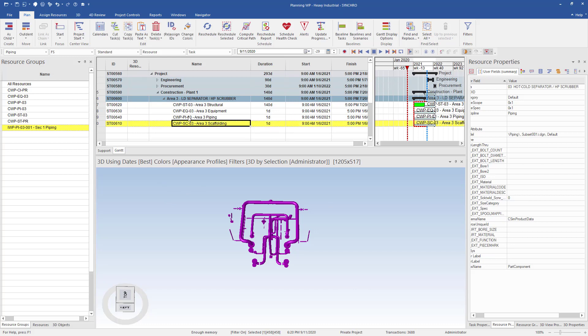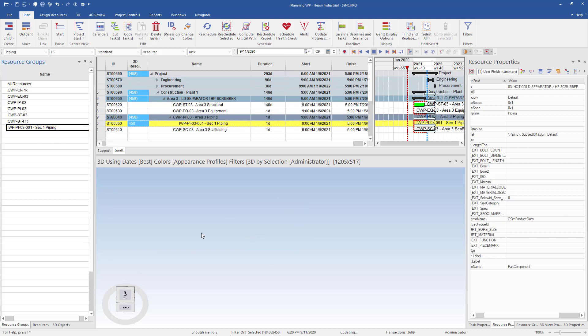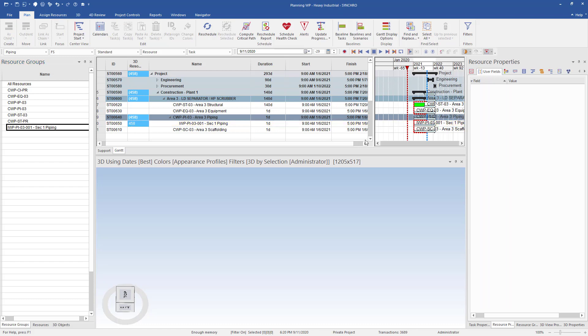I can now create a task using the resource group by selecting the parent task from the task list and the newly created resource group. Then right clicking on the resource group and selecting create tasks under selected task. Now you can see a child task was created under the selected task. We can now update the task duration and see it reflect in the Gantt chart.